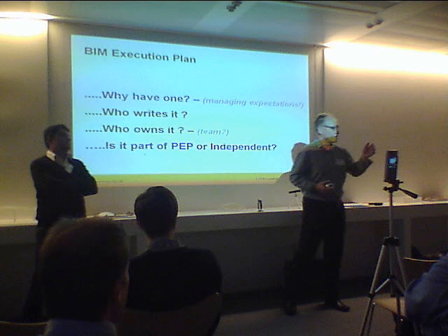But you can then start to have discussions about, okay, they're the users, they define a certain set of processes, and that involves a series of work. Who's going to be responsible for that work? Over three or four workshops in defining an execution plan, you can very quickly get to understanding the volume of work that those early assumptions give the rest of the team. Then you can start to have sensible adult discussions with your client about fee profile, fee amounts, and responsibilities and appointments. And you can be doing this through feasibility when people are still sketching.